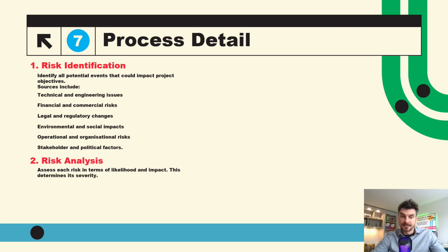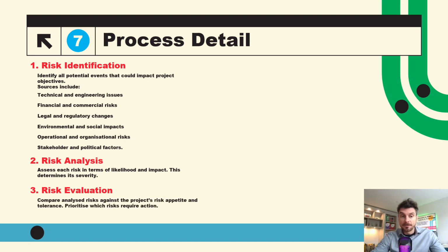Risk analysis. Assess each risk in terms of likelihood and impacts. This determines its severity. Risk evaluation. Compare analysis risks against the project risk appetite and tolerance. Prioritize which risks require action.